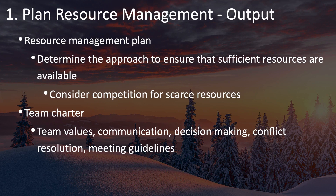Your team charter is where you will record the decisions you've made about team values, communication guidelines, decision-making, how you'll resolve conflicts, and your guidelines for holding effective meetings.